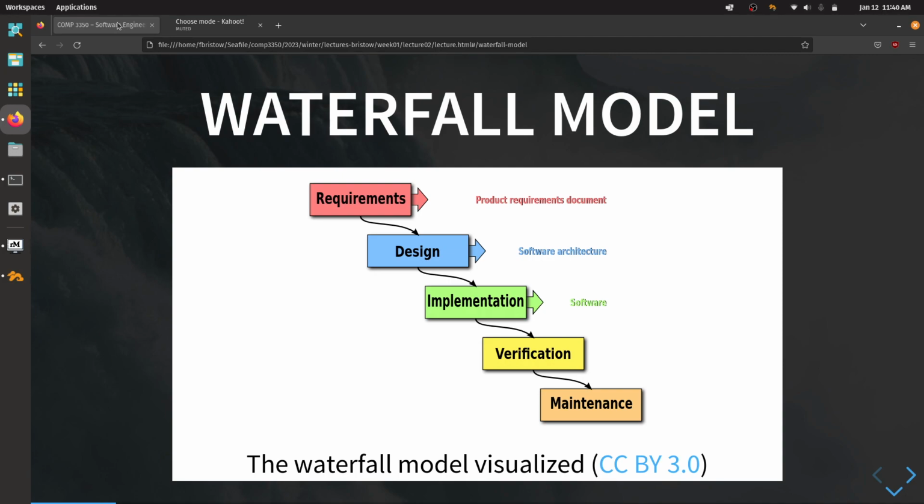As we're going through this flow, as we're going through this process, each of these phases are done by different teams. So we had our requirements gathering team here. They gathered the requirements from client A. Once they produced that requirements document, they passed that off to the architecture team. The architecture team started architecting and designing that application. Our requirements gathering team moves on to a new client and starts working on something else. And we keep passing this down the workflow, and each team continues to work independently of all of the other teams.